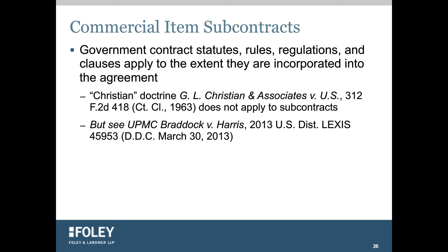Now, the exception to that, and where we work with contractors, is if the contract itself includes some applicability language. So oftentimes after a clause there will be a parenthetical that says it only applies to contracts over $150,000. Well, if your contract's only $50,000, that's an agreement between you and the other side that it doesn't apply, and that will help you. But don't believe them.